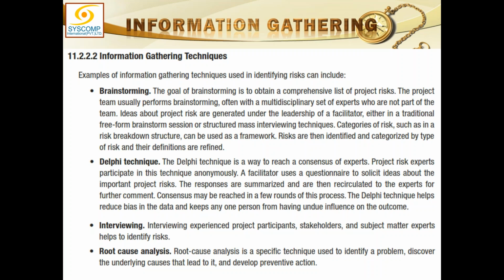the stars are counted against each point, and whichever gets the maximum number of votes, the list of 30 is sorted in that order. And ultimately the points which have got maximum votes, maybe the top 10, are chosen. So you see, the whole process of brainstorming, or for that matter data gathering, has been streamlined in this kind of Delphi technique.